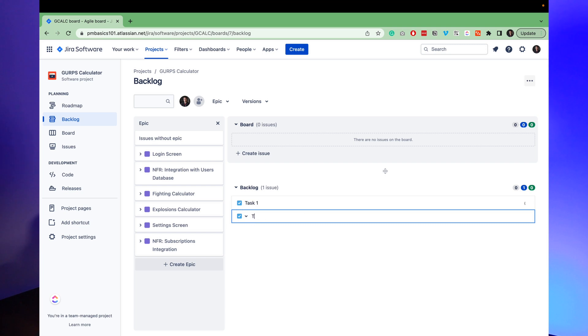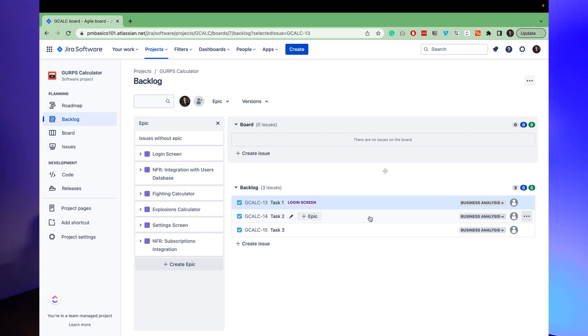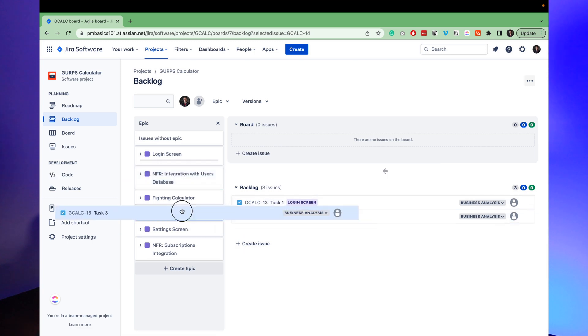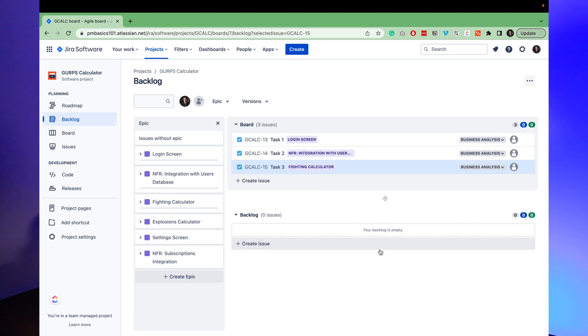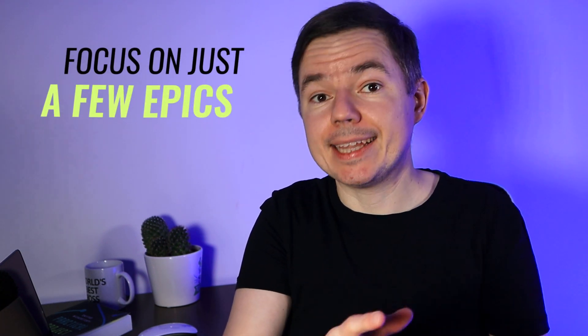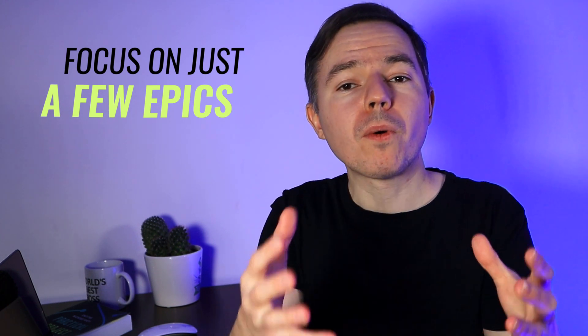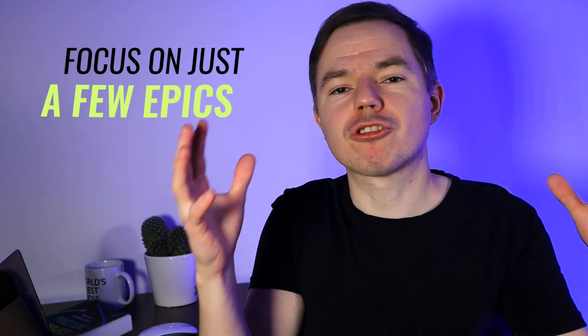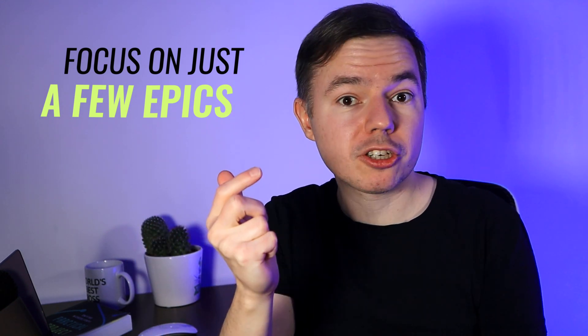You can rapidly create tickets in the backlog without filling out all the other fields. Likewise, you can easily link tickets to epics here — just drag and drop tasks onto epics. Here's an insight from the real world: you need to focus on just a few epics and get them done from start to finish. Otherwise, your project will become an uncontrollable mess where people have to multitask and switch attention between different features of your application.